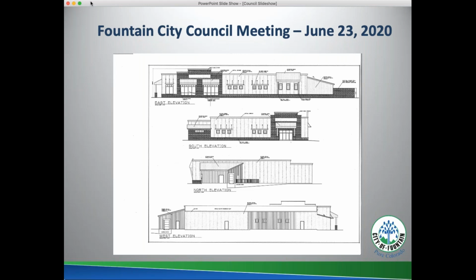So this project actually assembled 4 site parcels. It was intended to develop a 15,000 square foot commercial building. It was forecasting to have 4.7 million worth of revenue projections of sales under its operations. And the cost to construct this new development would be about $2.7 million. It would generate about 17 new jobs in the district, with approximately 4 new jobs added every successive year forward if it was meeting those forecasted sales projections of its operations.